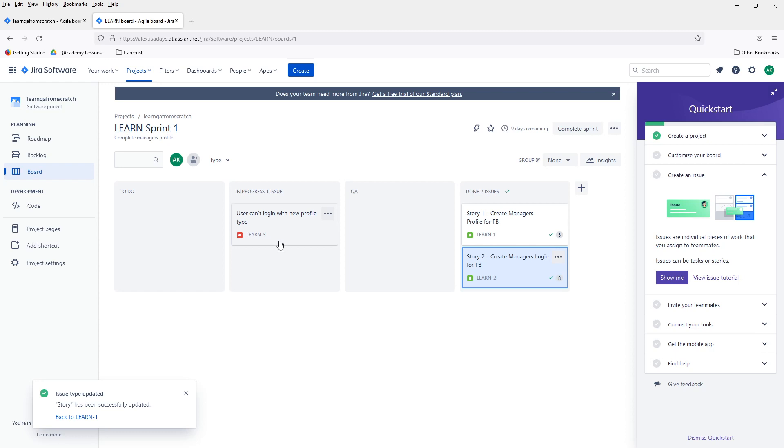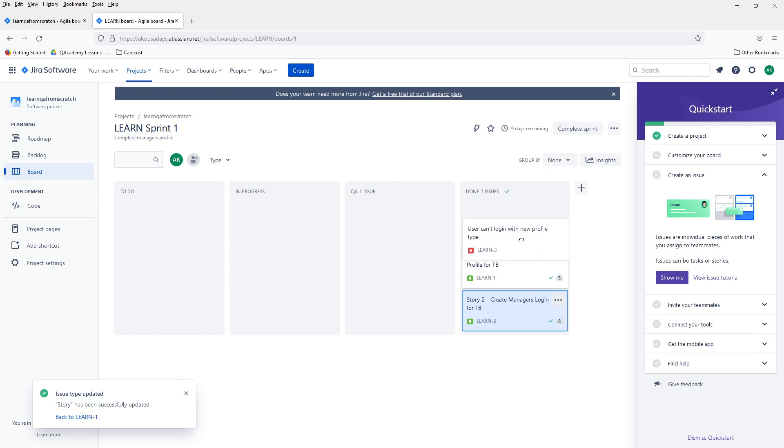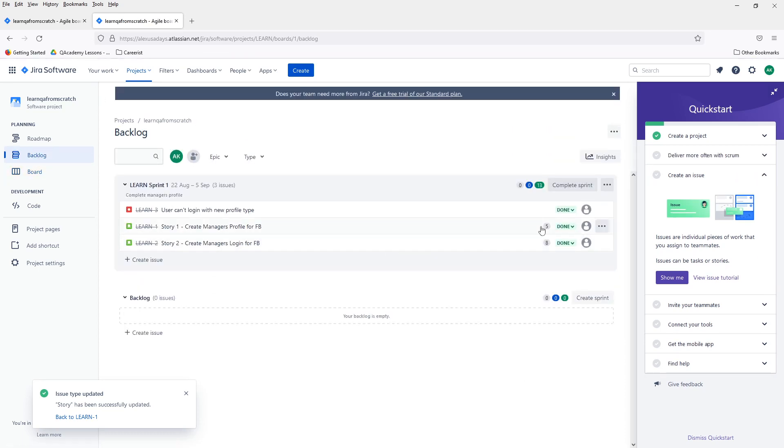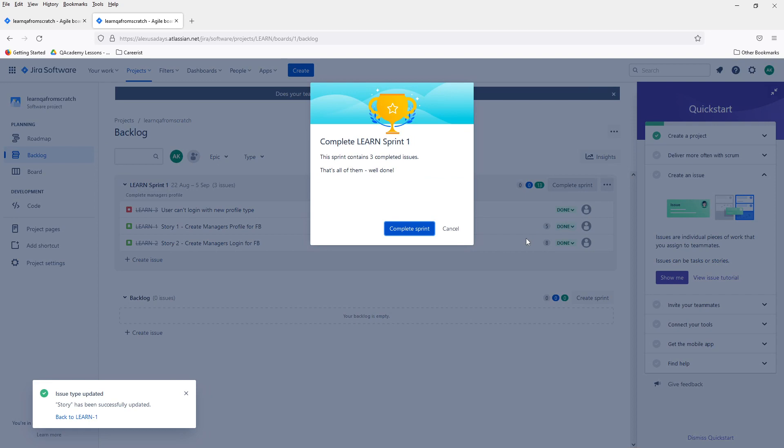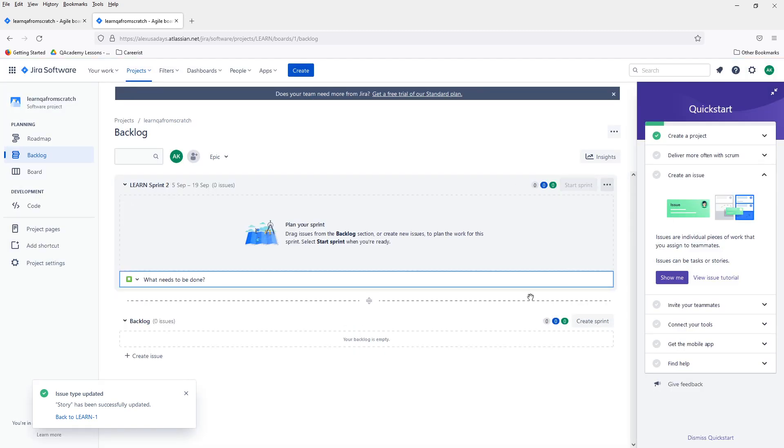If some requirements are violated they will open a ticket or just send it back to development, so it will go back to developer and developers will fix it. Then it will be back in QA again. QA verifies that everything works as expected and then it goes to done. Same process with other stories goes into development, QA, into done, and with the bug the same thing goes into development, then QA verifies the bug was fixed, would run some regression testing making sure no other things were broken and then also done. So two weeks past, all of the work in the sprint was completed, everything now is done, great success. If we take a look at our backlog, we see they are crossed out. We can essentially, two weeks past, let's imagine two weeks past, we complete the sprint. There is a metric called burndown chart and essentially it's like a chart that shows how much stories, how much points are left and when is the end of the sprint. So as the time progresses you can see how it kind of goes down to zero from the 13 points down to zero or however many points was in the sprint.